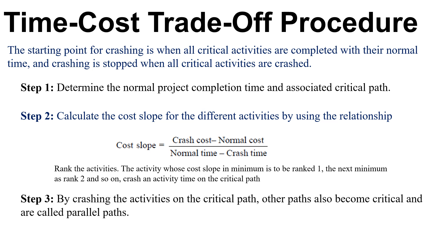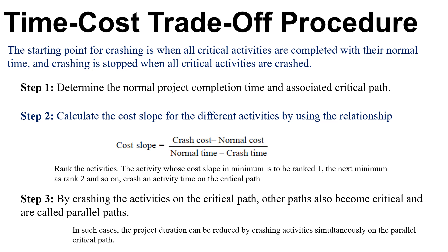The third step is that by crashing the activities on the critical path, other paths also become critical and are called parallel paths. This means during the crashing of a critical path, the duration of the project will be reduced and become equal to another path's duration. In such cases, the project duration can be reduced by crashing activities on the critical path as well as on the parallel path.